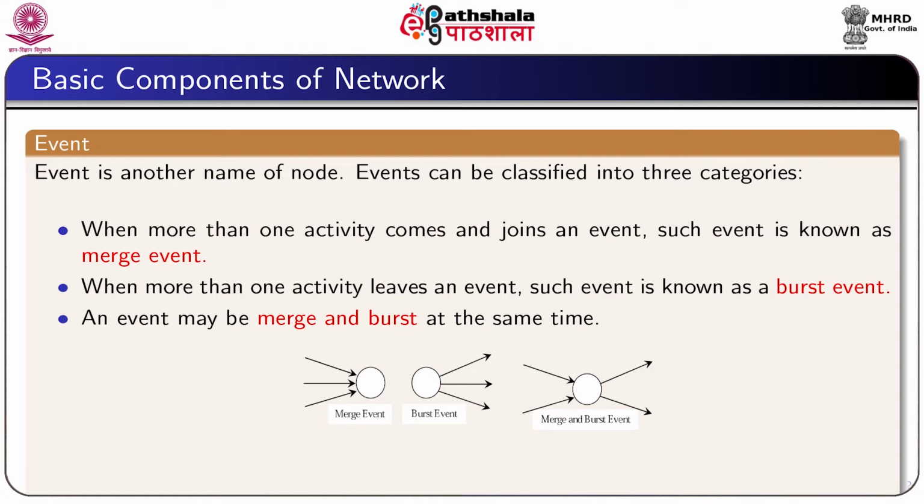Event, this is another name for node, and events can be further classified into 3 categories. When more than one activity comes and joins an event, such an event is called merge event. When more than one activity leaves an event, such event is known as burst event, and an event may be merge and burst at the same time. The merge, burst and merge-burst events are shown in the slide.